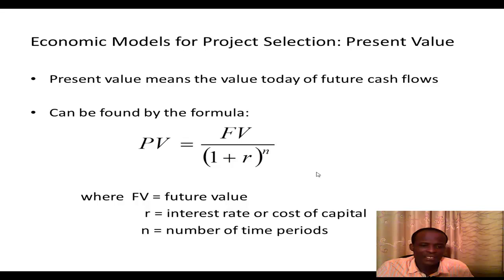So if you're working on a project, or you intend working on a project, that's estimated to have some cash outflows or inflows, then what you may want to do is to bring those cash flows to the present, and then find out the value of those monies in the now.